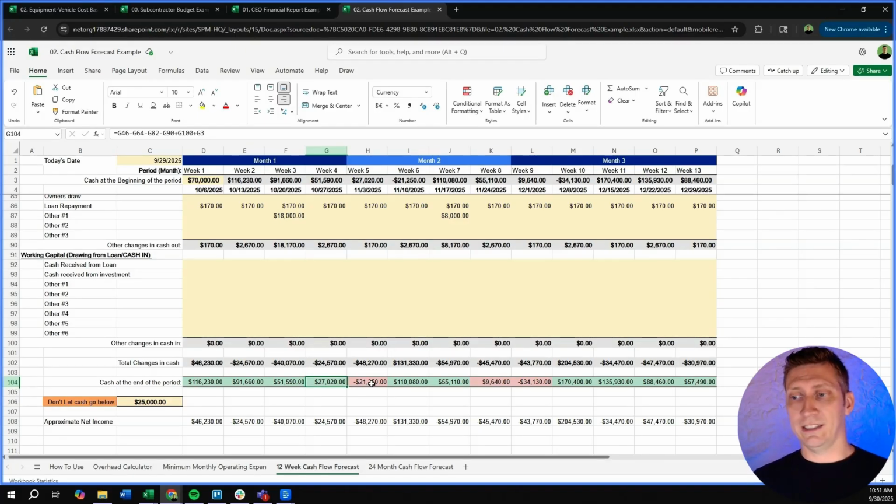So all this tells us when we're planning is we need to move expenses. Either I'm going to delay some payments if I can. Overhead, you can't. Rent, you can't. Payroll, you can't. But material, maybe you can work something out. Your loan repayments, maybe you pay early. Maybe we have this 170 that we're paying recurring. We can stop for a little bit. There's a lot of things. Or maybe we take out of our sweep account